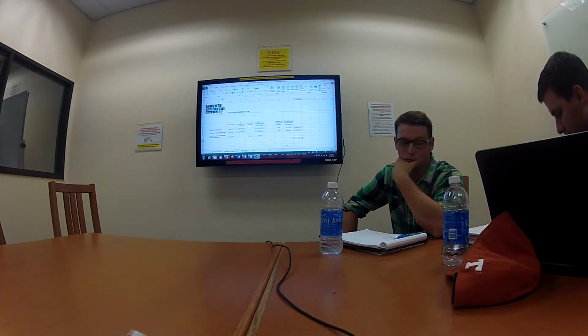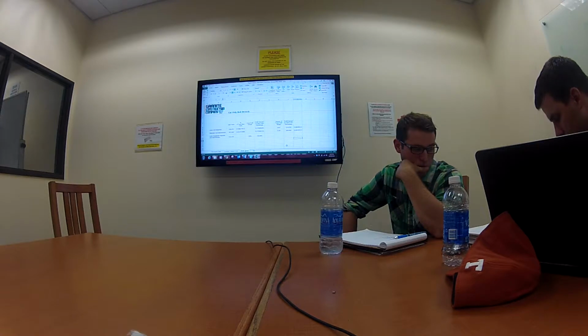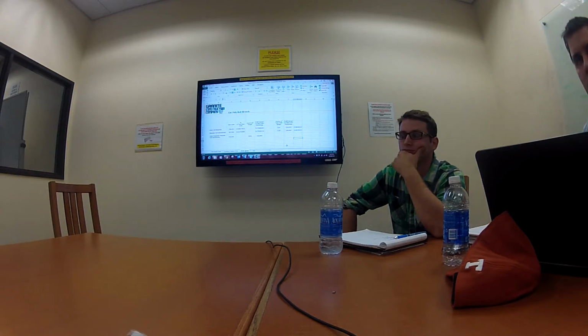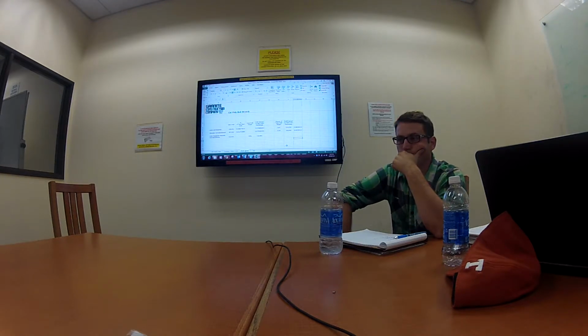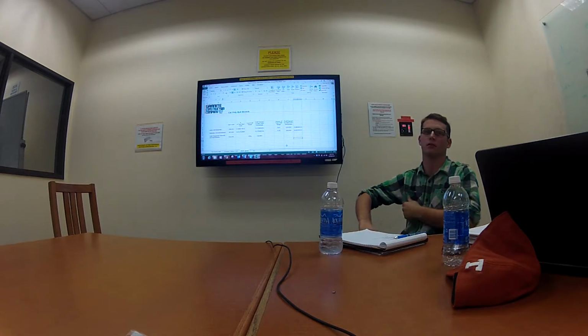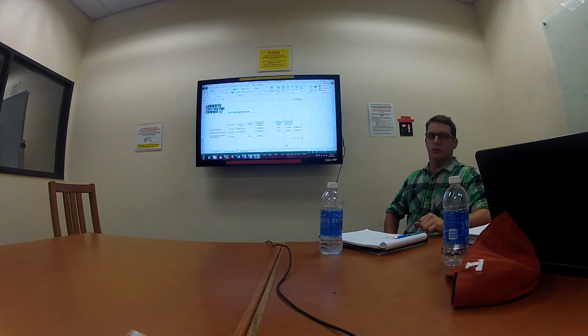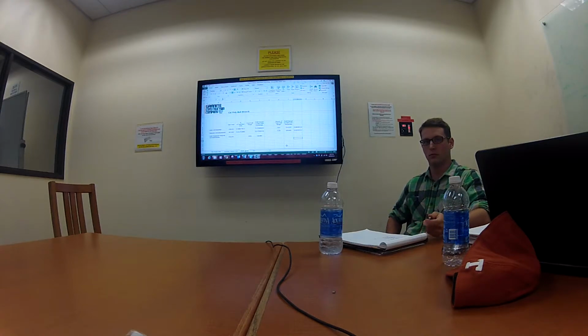What was it, 10%? Yeah, material. 5 was the subs. Yeah. Does it make a difference if a project is more labor intensive or there's more material? Definitely. Like a data center job. There's a ton of labor, so you're going to have more risk, so you have to put more money in it. And you have a ton of cost in material on it too. So if you put too much percentage in material, it's going to affect your overall, because what you always want to look at at the end of the day is what's your total profit margin on the job, which is 35%.